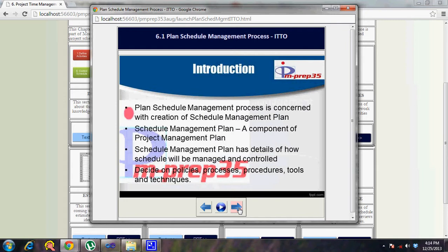The Plan Schedule Management process is concerned with the creation of the schedule management plan, which is a subsidiary plan and part of the project management plan. The schedule management plan details how the schedule will be managed and controlled. It is used as a baseline document against which the project manager can cross-check the performance of the project, monitoring actuals compared to what was originally planned.